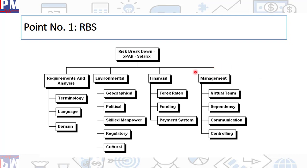So for example, this is taken from my project, a very old historic project called expand solar X. In this project, the categories which are applicable to my project were requirements and analysis, environmental, financial management, and there were quite a few more. Within requirements and analysis, some of them would be connected to terminology, the language, domain, stuff like that. All of these have been broken down.